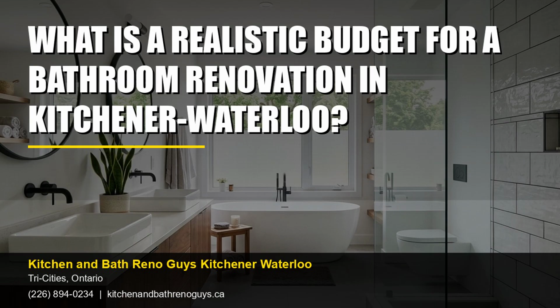Breaking down expenses: materials, labor, and permits. When planning a bathroom renovation in Kitchener-Waterloo, understanding the costs associated with materials, labor, and permits is crucial to setting a realistic budget. Typically, a bathroom renovation can range from $10,000 to $25,000, depending on the size and complexity of the project. Materials usually account for a significant portion of the budget, so choosing between high-end and budget-friendly options can greatly affect your overall costs.